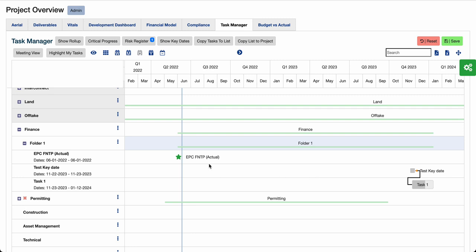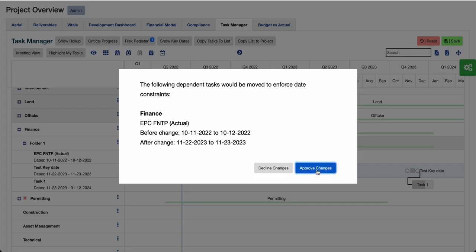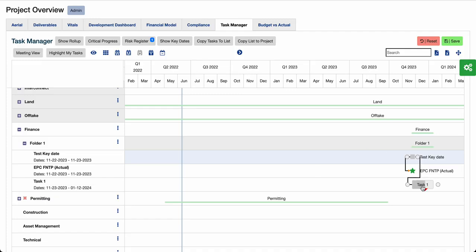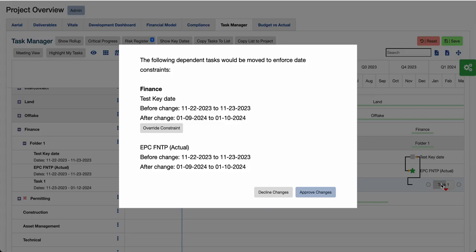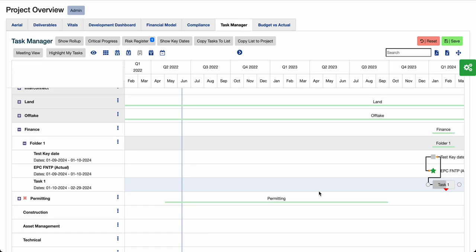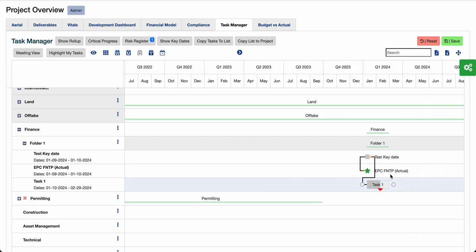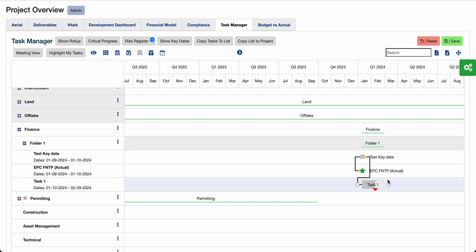Yeah, so now the milestone exists in the Gantt chart, and we are able to move it in the Gantt chart. We're able to associate it to a dependency, and we can have it move as a result of the dependency. Now, if I move this task to the right, it will cascade the dependency down to the milestone.